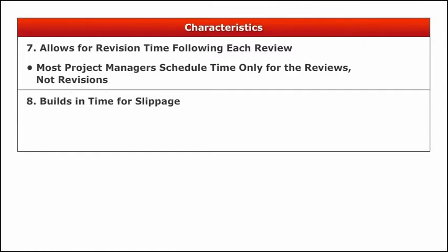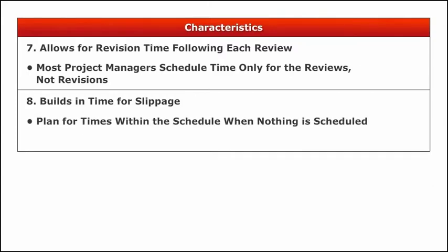8. It builds in time for slippage. Plan for time, or even several periods of time, within the schedule when absolutely nothing is scheduled. Use that time to catch up on those tasks that have fallen behind. If your schedule is so tight that you cannot find any slippage time, use the weekends. Do not schedule any activities for Saturdays or Sundays, and use them instead to catch up when you fall behind.